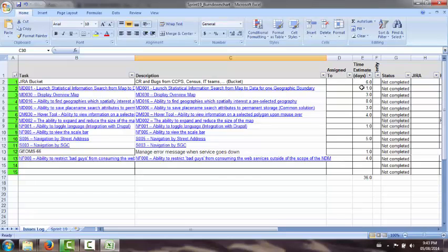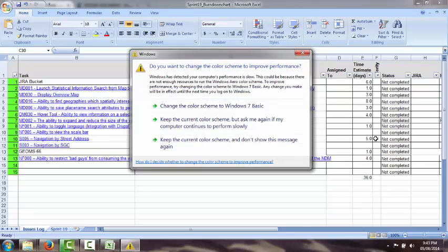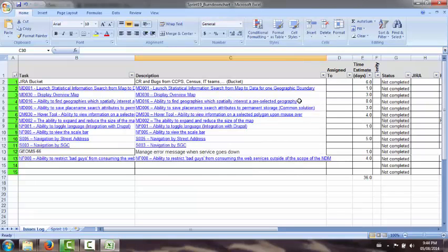If you don't have the time estimate, let's say if it's a small bug, you might choose to do the estimate right there at the sprint planning meeting. So you might just do a long list of the tasks that the client wants in terms of features, and then prioritize them with the client. You have to take note that not all of the features or tasks that the client wants may actually fit in the sprint.